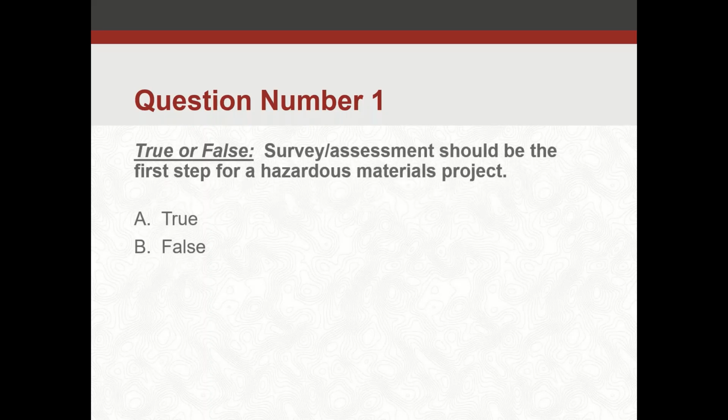All right, question number 1, true or false? Survey and assessment should be the first step for a hazardous materials project. The answer there is false. That first step is defining the project, and then we can figure out how to survey and assess it.